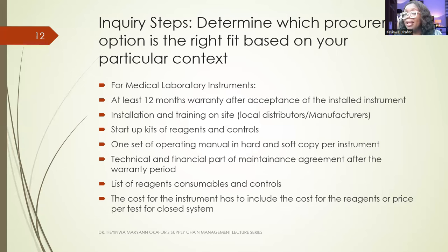Then the technical and financial part of the maintenance agreement after the warranty period. You need to agree at this stage how you will continue your equipment maintenance. So you need to agree on the technical and financial part of the maintenance agreement after the warranty period is over.